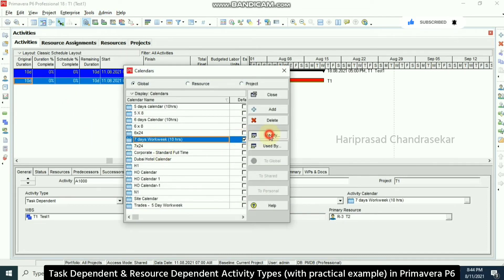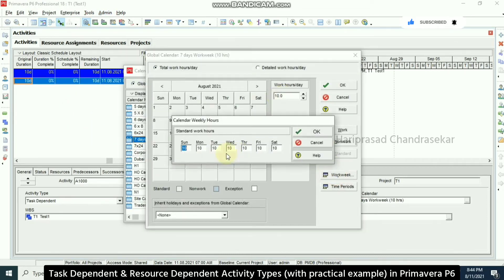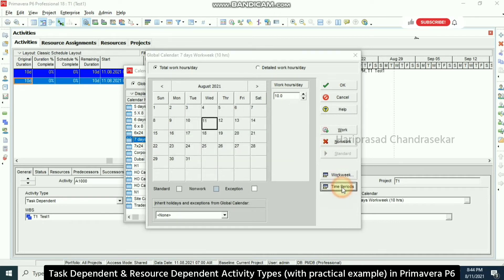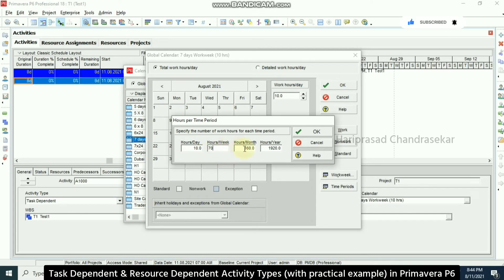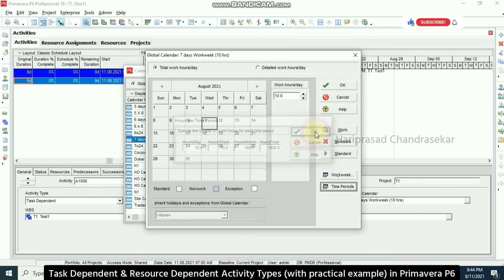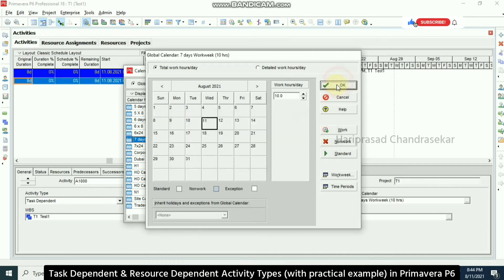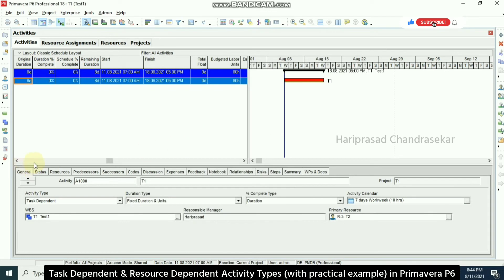In the calendar, I'm going to modify it. We have a work week of 10 hours every day, but in the Time Period section it's not been updated — it still says 8 hours per day. It should be 10 hours per day and 70 hours per week for a 7-day work week. We don't need to update month and year — just day and week. Click OK and close.